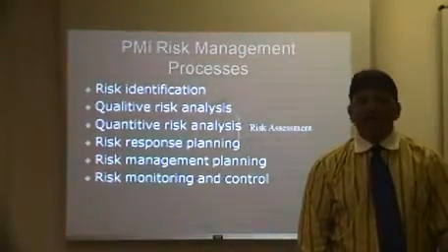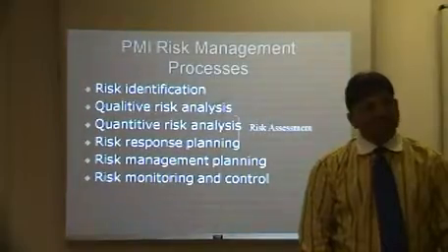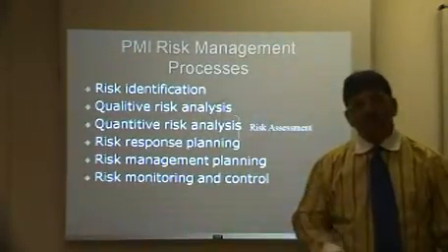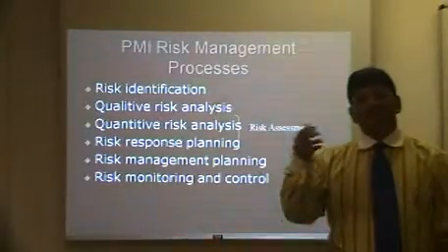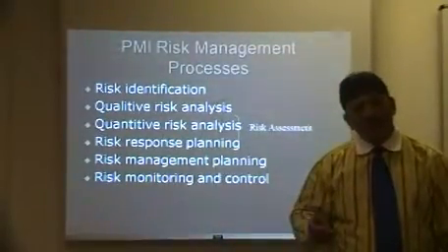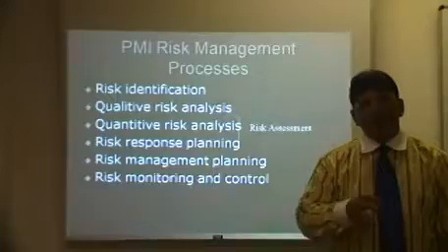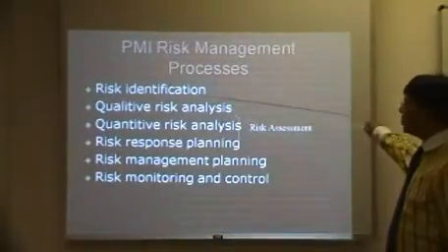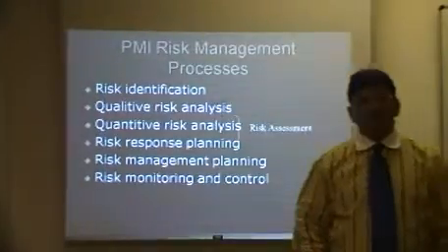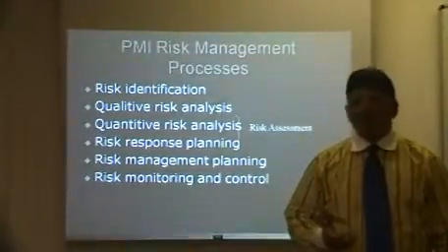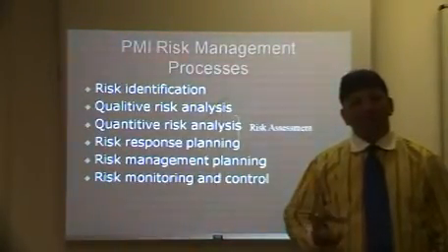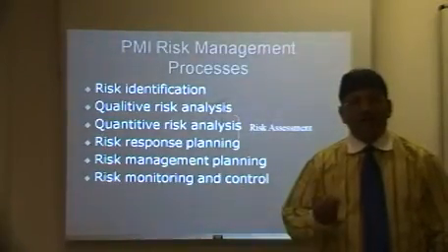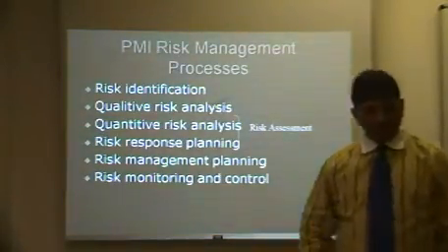Obviously, you can have a look at previous projects similar in nature, and you can extract from the lessons learned database mistakes that people have made on other projects that you can use as a basis for your current project. There are also the technical people who have the experience from the functional departments, and they are the ones who can highlight typical risk on your project.